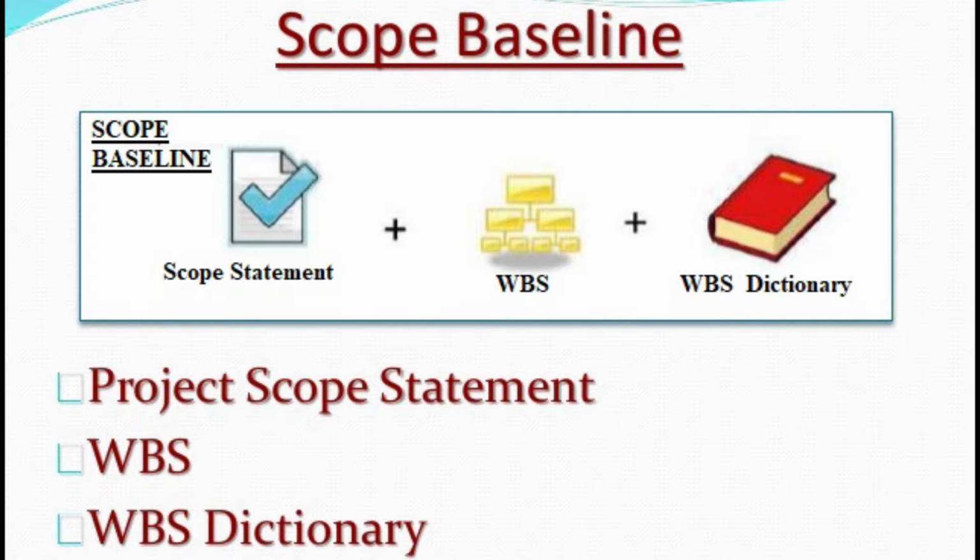A scope baseline is the approved version of a scope statement, work breakdown structure, and its associated WBS dictionary. Scope baseline can be changed only through formal control procedures and is used as a basis for comparison.